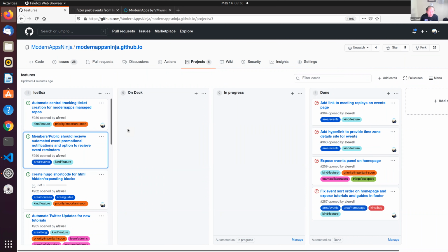But then you lose something when you open a ticket on the repository. Let's say you have a ticket that says, here's an issue having something to do with this particular course. Maybe there's a piece of content that is out of date. You say, here's an issue ticket on the Tanzu 101 course. This particular page is out of date. Well, at some point, in order for us to resolve that issue, we're going to make a change to the contents of that repository, right? And so if we start off with that issue ticket, we'll end up having a pull request that matches it. And that's really important for traceability in these environments.